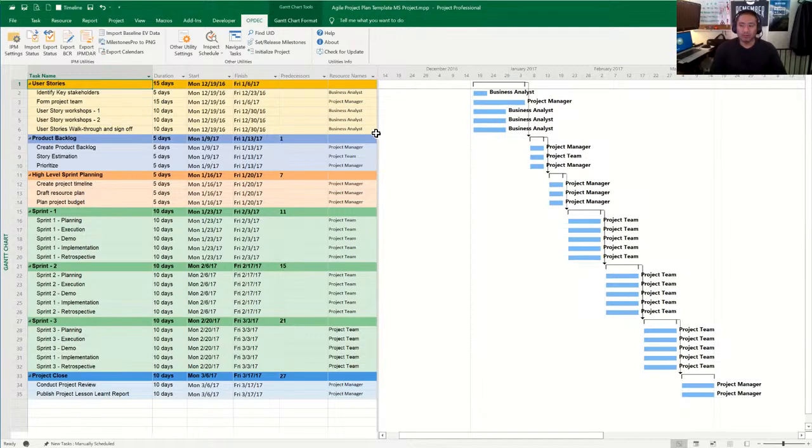that's more of an impact delay analysis, and my experience of doing it is, for example, we use task number 8, create product backlog, and we have a known delay of 100 days because the software won't get to us in 100 days because of weather and so forth. All the uncertainties come into play.